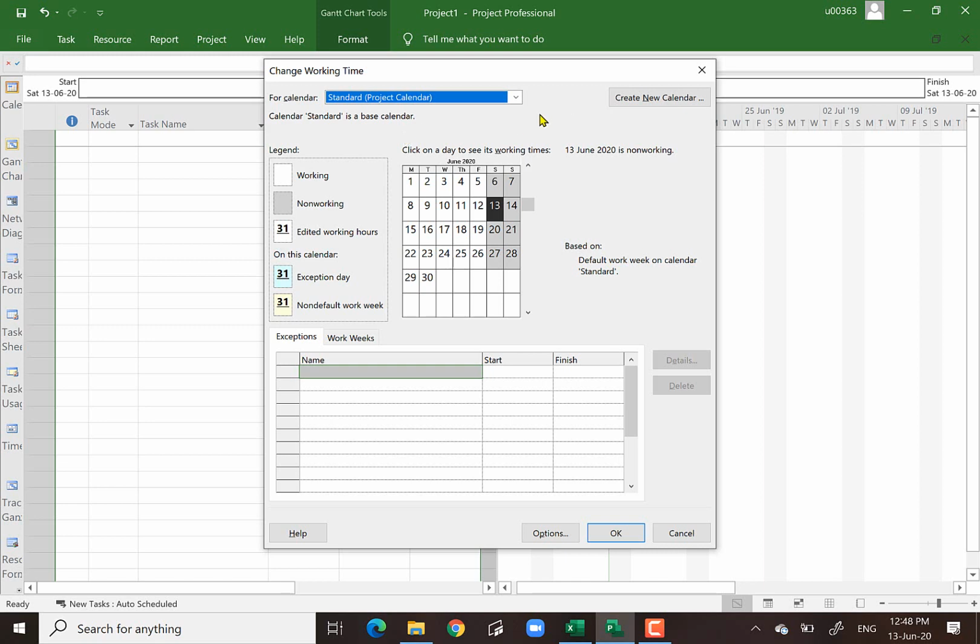And you know what? Once you input resources, all the names of your machinery, your manpower will appear under this. Meaning to say, you can customize the calendar for each person, for each machinery, and you can print that out. All right. But now, since we have not input anything yet, we just have the standard calendar for the whole project.